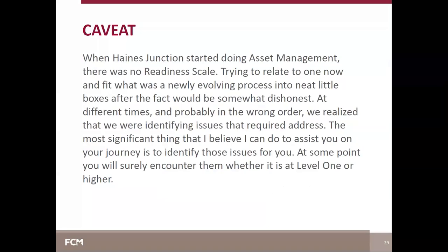The territorial government's role restricted the number of repositories where asset management information, costs, and acquisition dates were stored — to municipal records, government records, or the territorial archives. Despite the relative ease with which we were able to gather our data, it was an incredibly time-consuming process, and our treasurer spent about four months of dedicated time tracking down data on our 300 or so tangible capital assets.